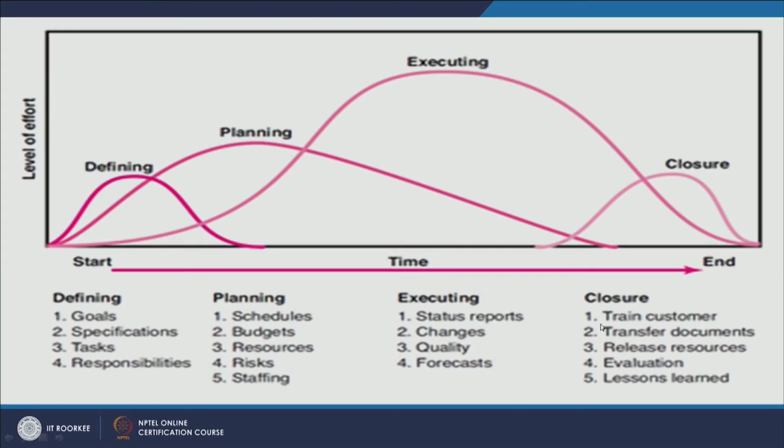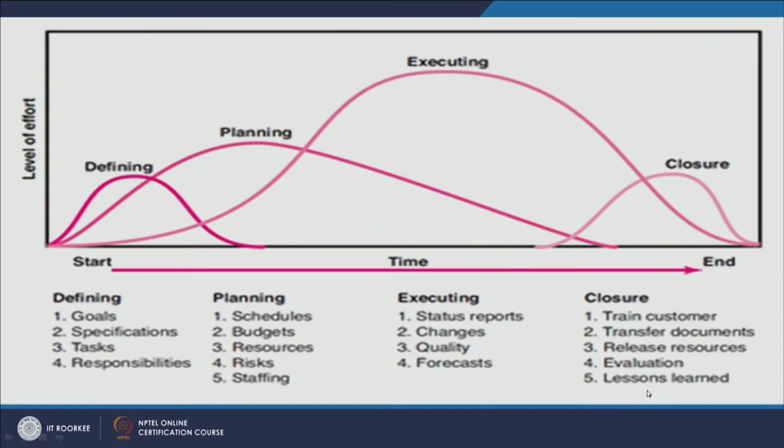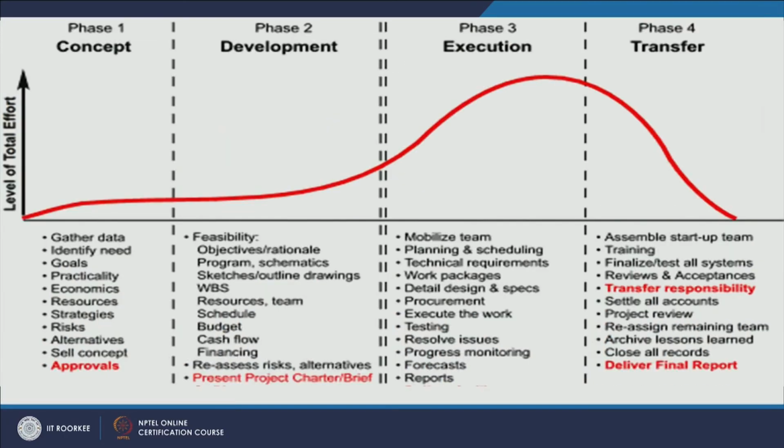And towards closure, you need to train the customer for whom you have made that project, then transfer project-related documents to the client, release resources, evaluate the project you have given to the customer, and also record what lessons you have learned during implementation of that particular project.